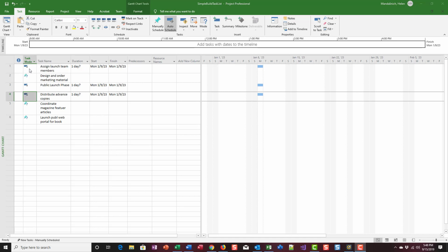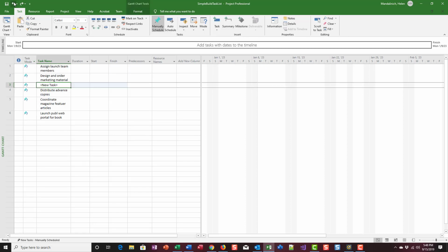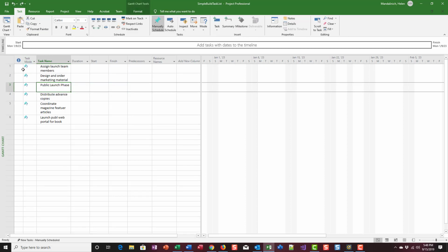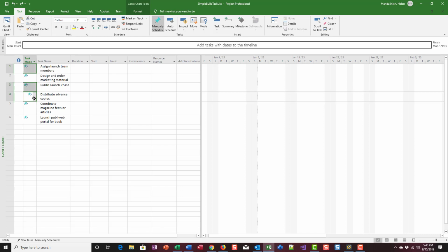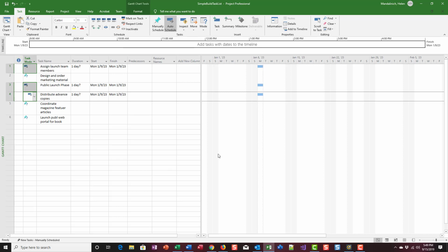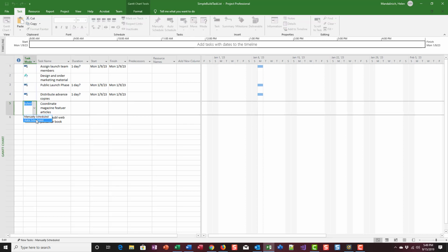Okay, I think I told you to do this one wrong. We were supposed to do this using the task tab up here. Sorry guys, I'm going to undo that. Let's undo this and show you the right way. Whoops, too far. Okay, so I'm going to select 1, 3, and 4, right? I used my control key. I'm going to come up here and do auto schedule, and now it applies to all of them. When you have multiples, I just pressed control and I could select non-adjacent tasks. Now we're going to use this to switch 5 to auto scheduled.